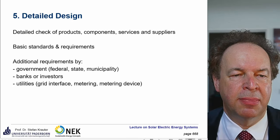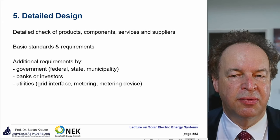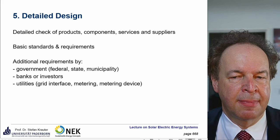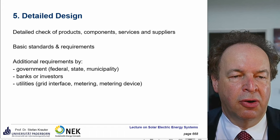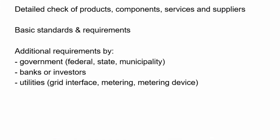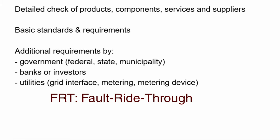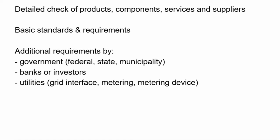There may be additional requirements from the government — for example, you have to show the company has long experience and exists for some time, and is able to withstand a crisis. Also for the banks, investors, or utilities — so the grid interface: how much harmonics can be fed into the grid, what happens if the grid is shut off, will you be paid, or do you have to immediately shut off the power plant? Sometimes there is a fault-ride-through requirement, where the power plant keeps operating for some milliseconds to override a power failure and help keep the grid running. Also for metering — you have to make sure the meters are all certified and calibrated. Sometimes there are requirements to use locally produced metering devices to ensure the metering is correct.